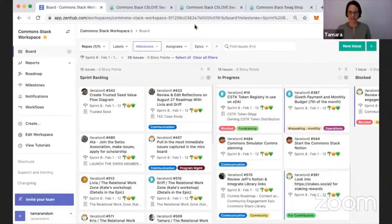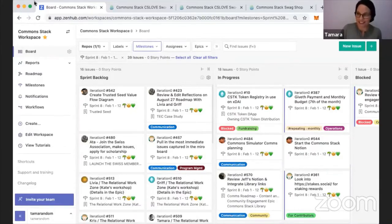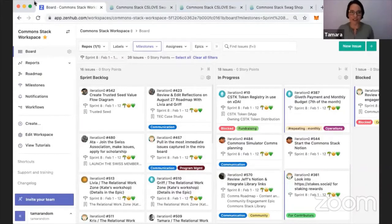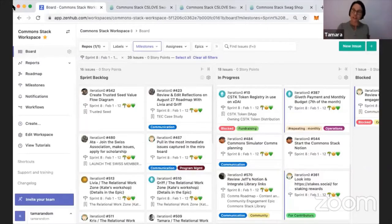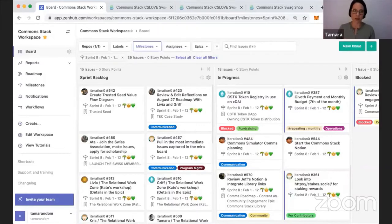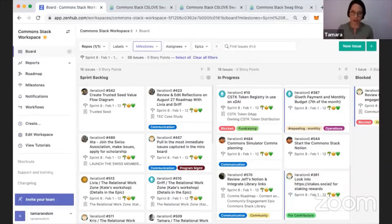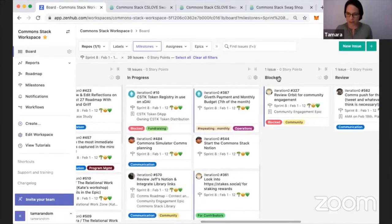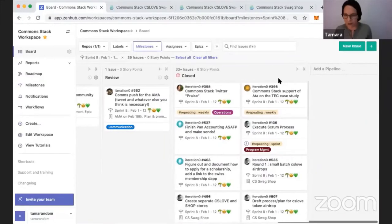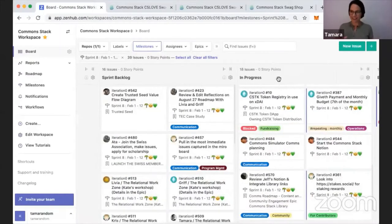These sprint review calls are part of us saying goodbye to the last sprint. This sprint, 'Getting Word Out,' we're about to say goodbye to. Right after this call we will clear this sprint board. We will move everything that's still open into the product backlog and meet again on Monday morning to reprioritize the entire product backlog for our next two-week sprint. We're getting a lot better - we have about 40 still open and 30 closed.